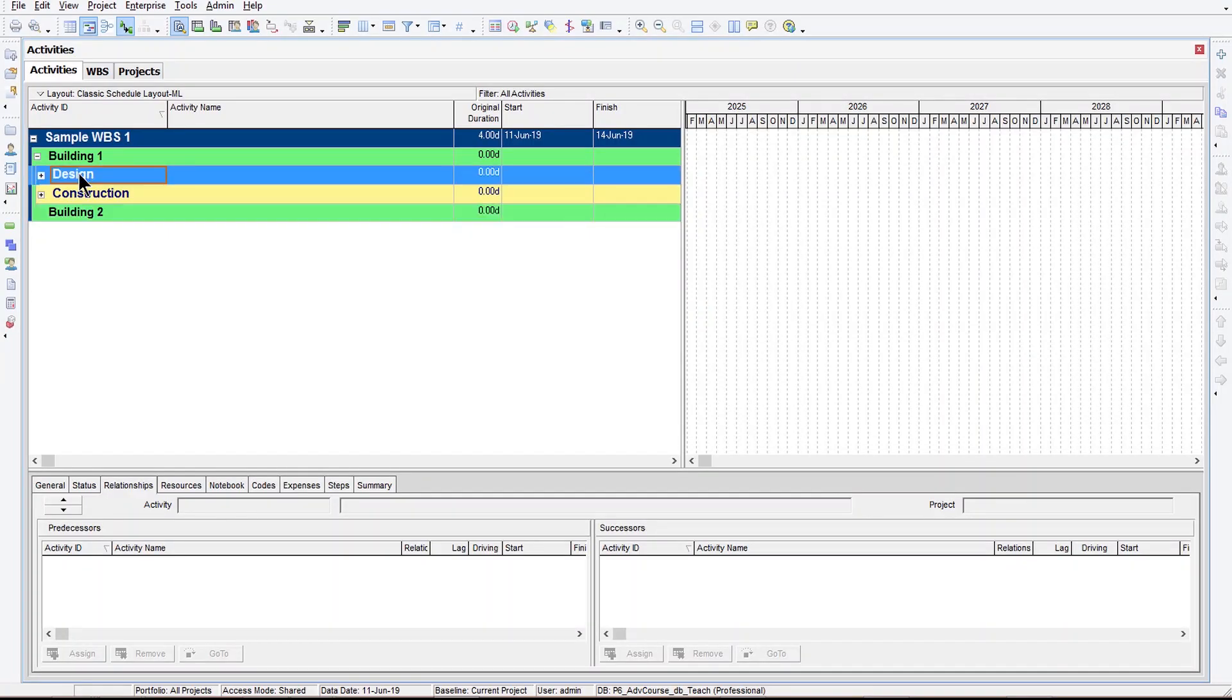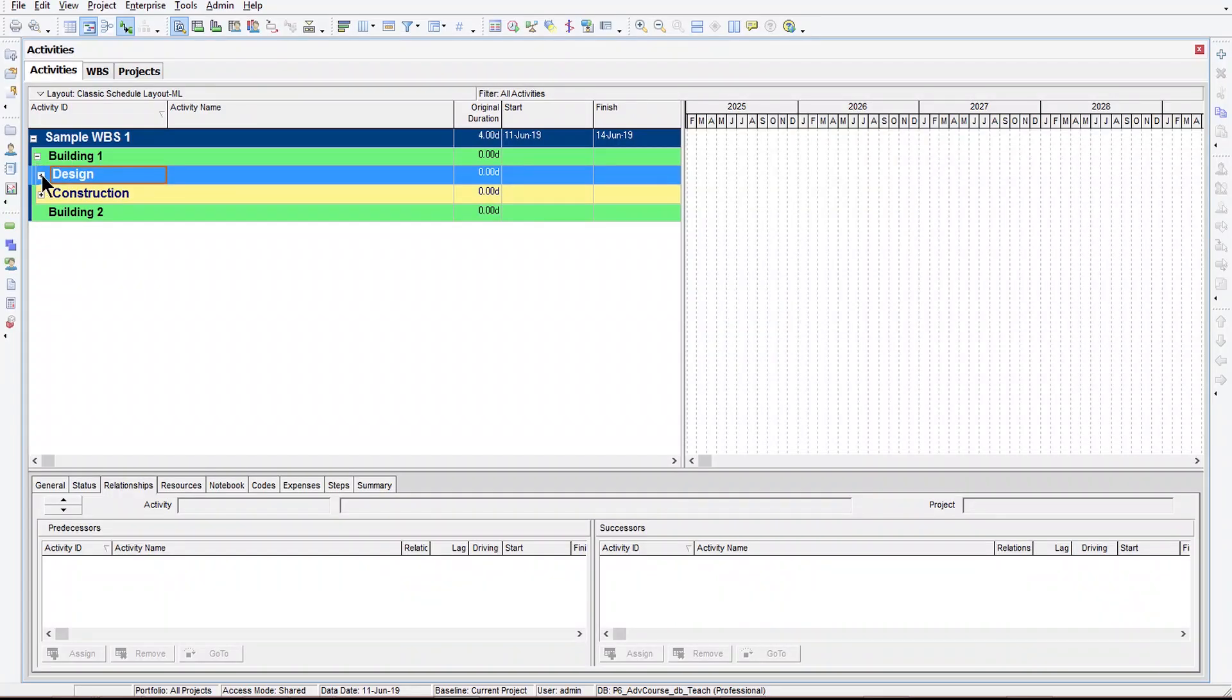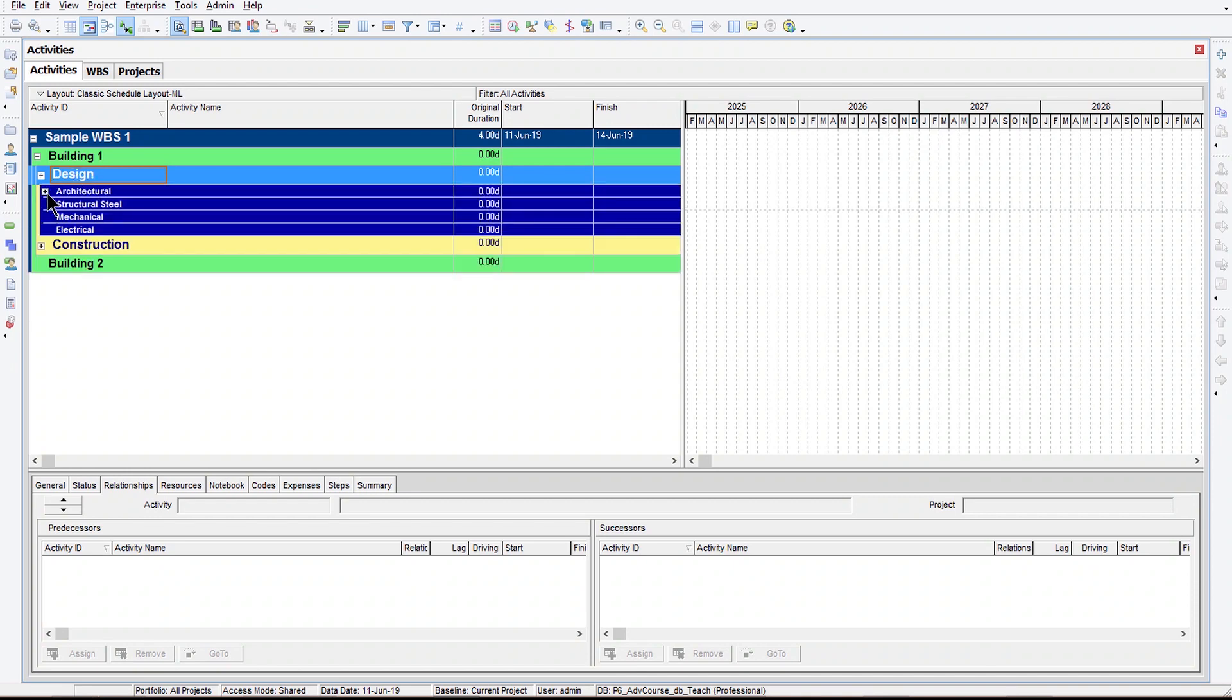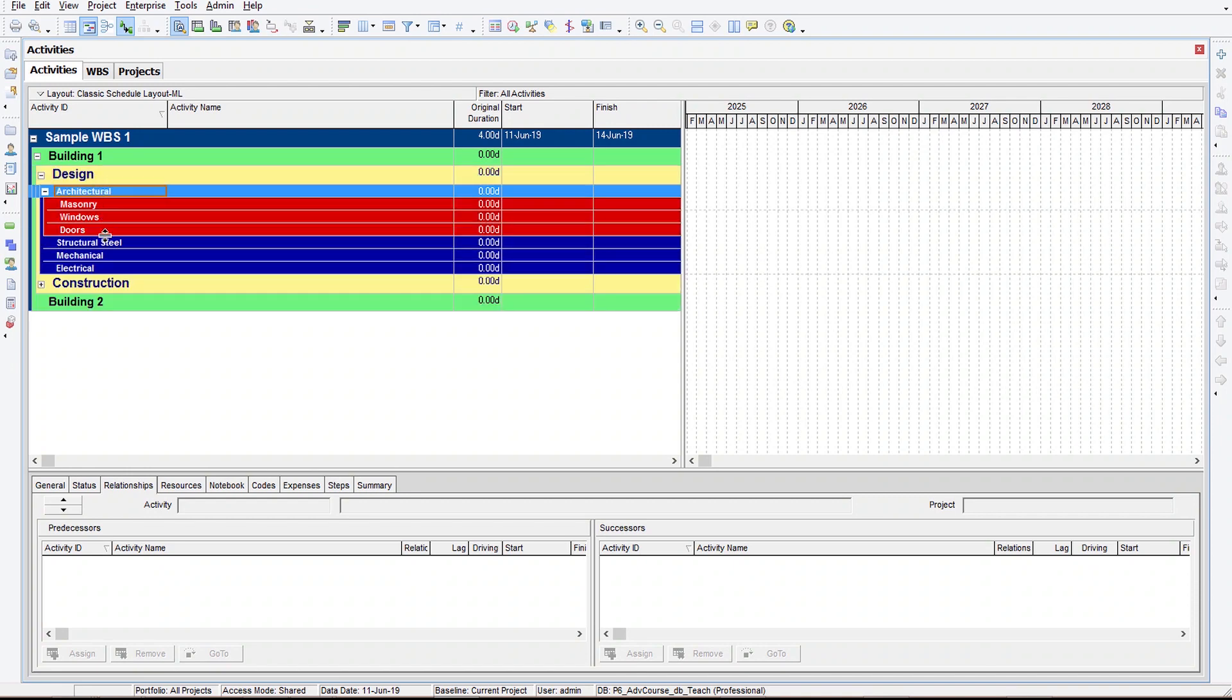And then underneath we're adding design and then construction. So we're breaking those two apart. We're putting all the design activities in one area. We're putting all the construction activities in another area. Now, if you have to break your design work down further because there's a lot of it in your project, then as you can see, we've broken our design work into the different components. Again, architectural structural steel. So those are getting into sort of my big disciplines and then even smaller work packages underneath.